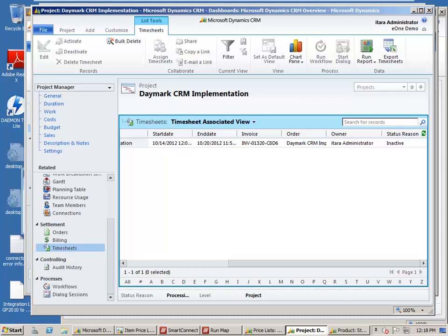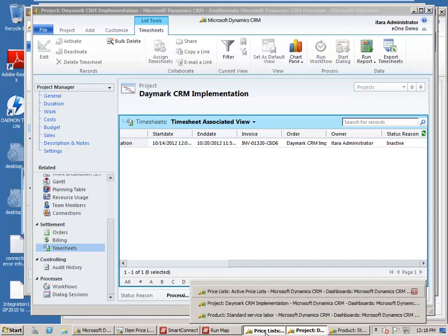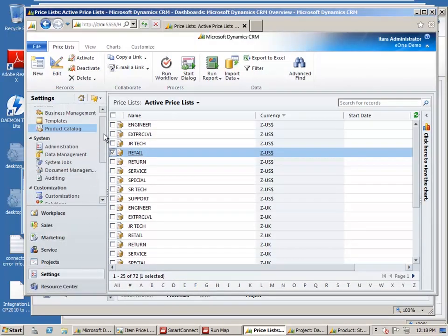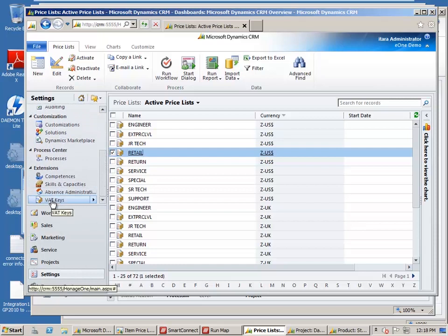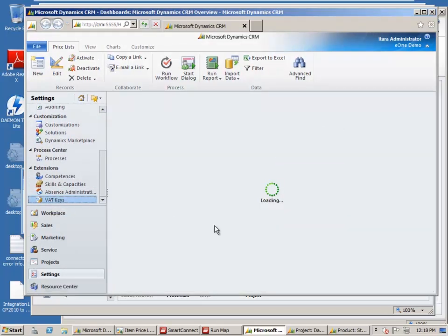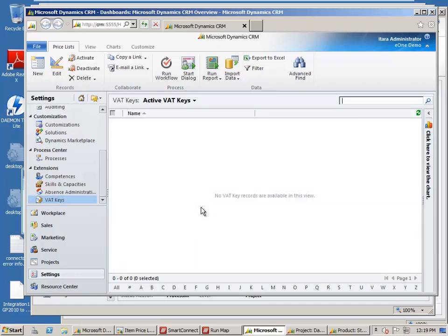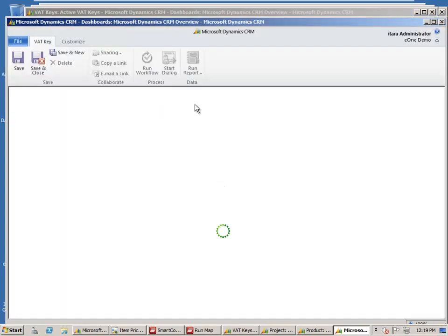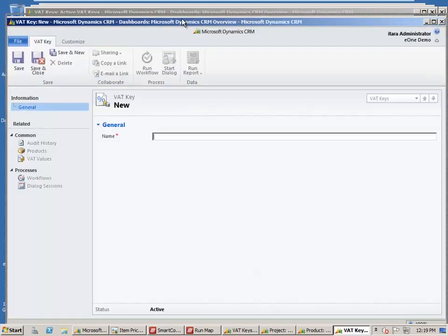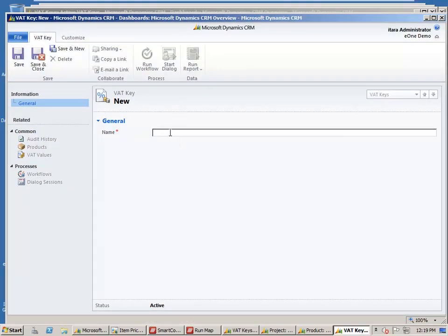You can see on the screen now the billing timesheet that I was working with. It only had one entry from Gary Wood. If there had been other employees that also made entries, as well as external consultants, they don't have to be CRM users. You can have external consultants making a time entry through maybe a portal, or they just submit their time and the project manager enters it. That would all be shown in here. Your travel receipts could be shown, mileage for travel if you wanted to. All of it on a single timesheet, and then it goes on one invoice. And your invoices would be by customer.